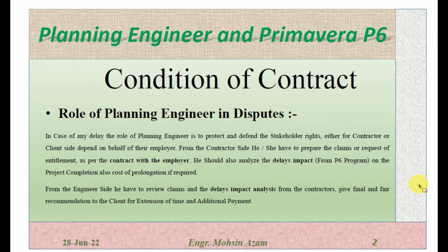So those planning engineers who are representing the engineer, who is actually the representative of the client for the project, should analyze the delay, the claim and the impact of this delay on the project completion date and on the budget, and give the recommendation to the client based on his determination.